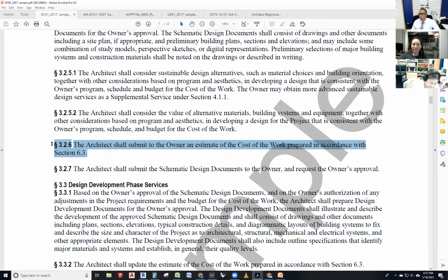Exactly. Because we wouldn't be doing a cost per wall or a cost per window. We don't even know. We're gonna factor in a cost per square foot. We know how many square feet this is, and then maybe we throw in some numbers for things that we actually can anticipate, like systems that we know. The HVAC system, we used it on another project. It came out X and X. It's gonna be X and X, generally speaking.